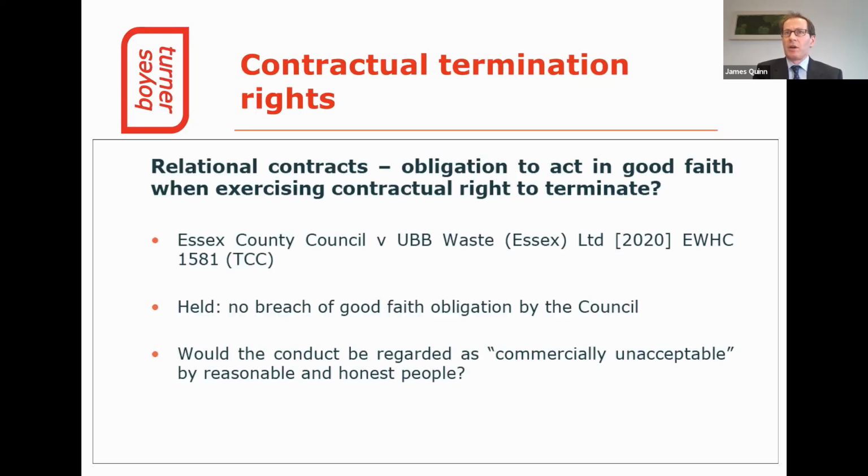Earlier, I mentioned clauses which allow a party to terminate the contract if the other party becomes insolvent. Following the impact of the COVID-19 pandemic on businesses, in May last year, the government introduced the Corporate Insolvency and Governance Bill, and the Corporate Insolvency and Governance Act 2020 subsequently came into force on 26th of June last year. The purpose of the Act is to make temporary changes to ease the impact businesses face following the national lockdowns, and to make provision about companies and other entities in financial difficulty, and to make temporary changes to the law relating to the governance and regulation of other entities. The Act applies to all contracts for the supply of goods and services, but excluding banks and other financial services providers.